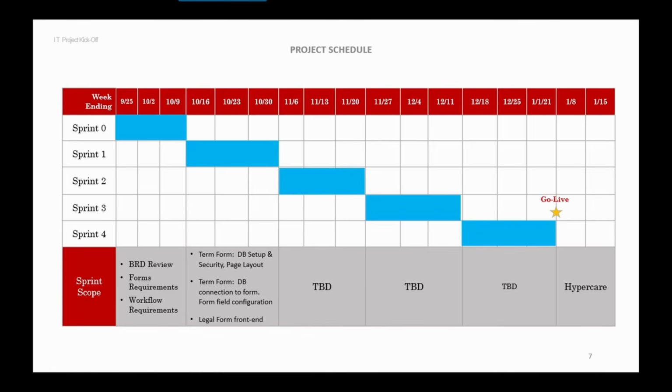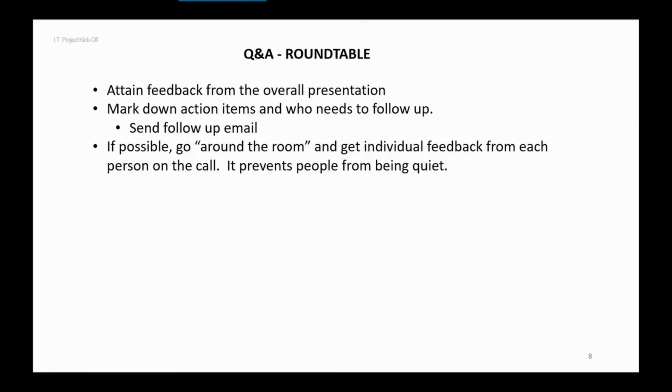But at least what you want to do for the first few weeks is that you need a plan here that shows what are the upcoming activities. If you need to gather requirements, you need to list that here, how long that would take, and what's the expectation to start doing the execution. So you want to have that at least. You don't want to come into a kickoff session not describing what the upcoming next actions are.